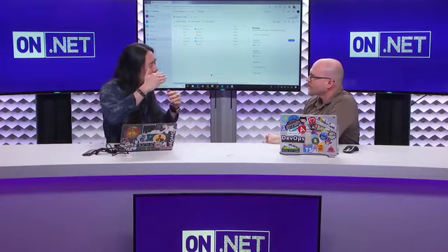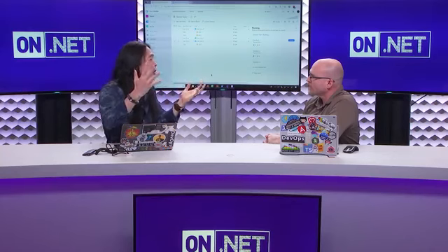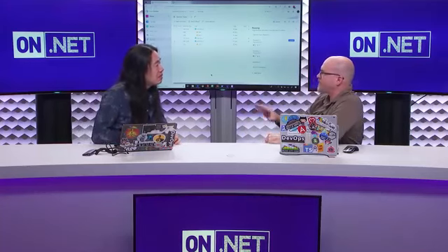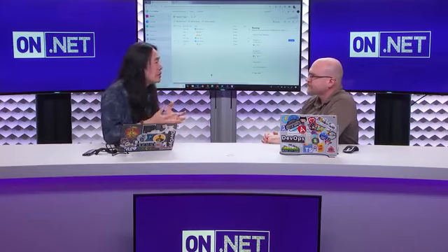So this list is great in terms of adding work, or maybe even doing some super high-level projection of, I think we're going to get about this much done by this date. But what it's not good at is tracking your work on a day-to-day basis. Right. So we have the daily stand-up, and we want a snapshot of just what's important for that day. Just for that sprint, right? Let's say our sprint is 2 weeks or something like that.